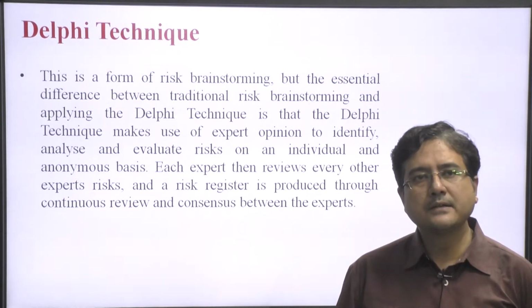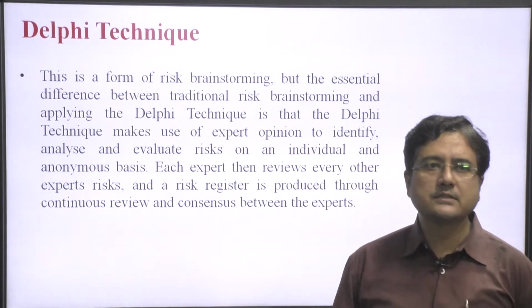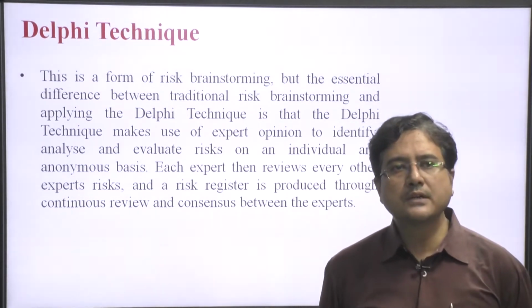Each expert then reviews each other's risks, and a risk register is produced through continuous reviewing.